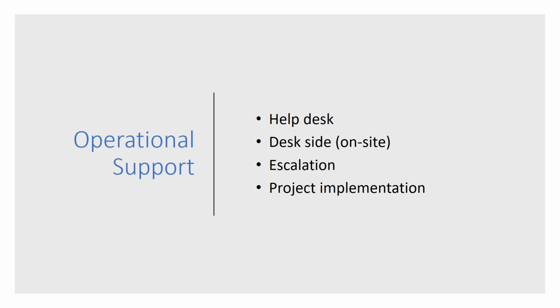If you have the same person providing help desk support as desk side support as project implementation, then there could be conflicts and something ends up getting short shrift. And usually it's the project implementation. So if you have your help desk staff working on projects, chances are the project is going to take a lot longer just because they're going to be distracted by the ongoing support needs of the organization.